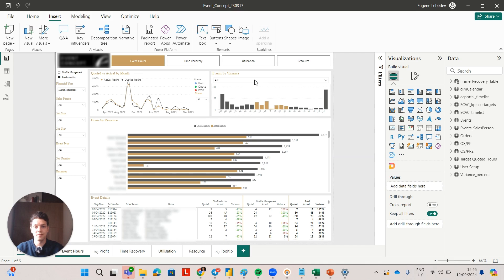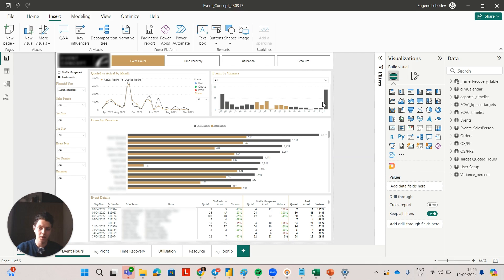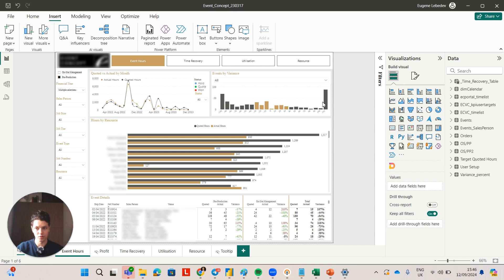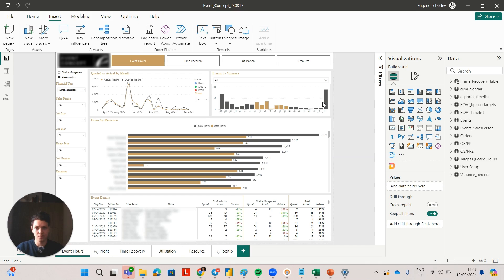The events where the variance is positive, which means they have quoted hours but no actual hours, that's basically a data entry issue. You can see those events and you can see that people just forgot to log their hours, so what you need to do is to tell your team to log your hours for this particular event.